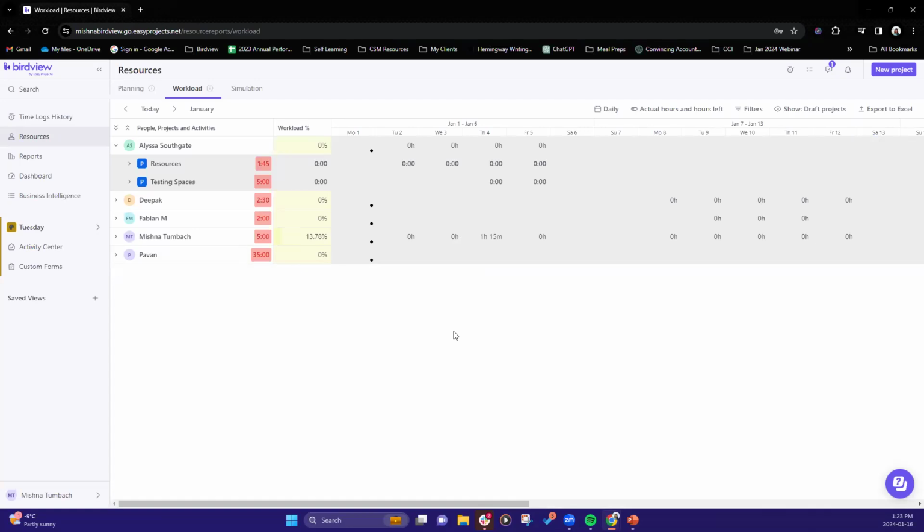I should be able to see as a project manager or as an administrator what's the number of projects, number of activities she's already scheduled for, so that if I'm looking for that resource, I know that I'm not going to over allocate Elisa. So that is one benefit and capability, in a sense that you have all this information consolidated into your global accessibility. So you can make sound decisions on resource allocations.